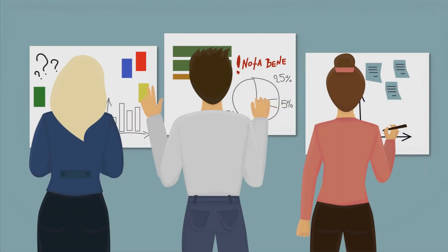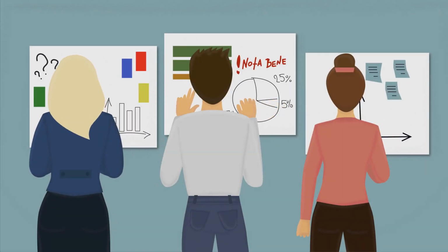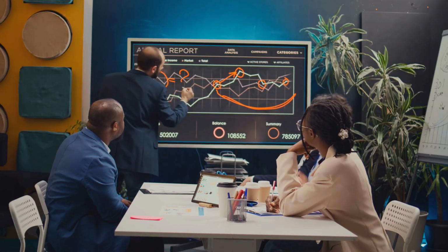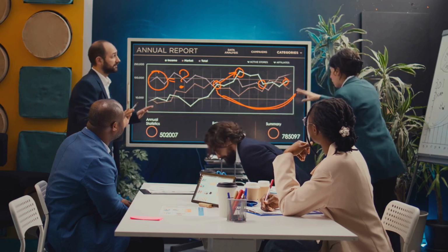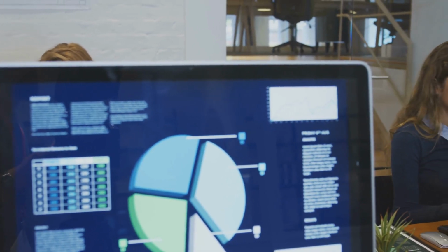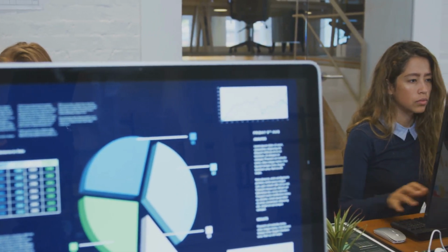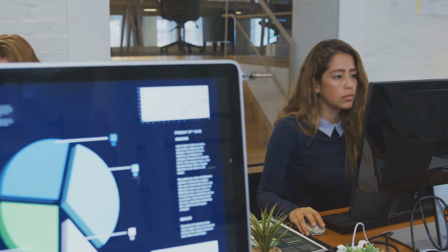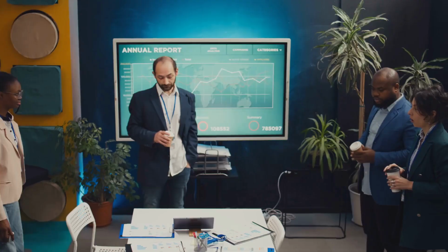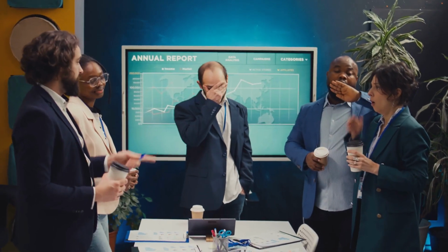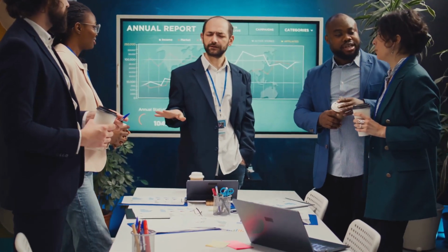Tracking spillover stories is important for the team's understanding of their velocity and the accuracy of their future sprint planning. Frequent spillovers can affect the team's velocity, the amount of work they are able to complete in a sprint, which is a key metric used to track progress and forecast future capacity. If the team consistently carries over stories without fully completing them, it can lead to a misleading velocity, where the team appears to have a higher capacity than they actually do.